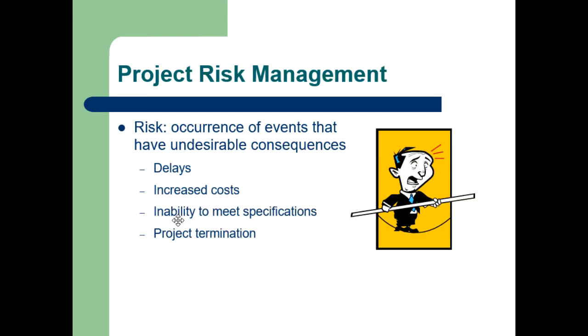Problems have a lot of risk associated with them because they're unique one-time events. So the thing I want you to remember about risk is to take it on as early in the project as you can, because it's easier to fix, or if you have to stop the project, you've spent less money. So don't hide from risk. Go looking for it and try to solve it as soon as possible.